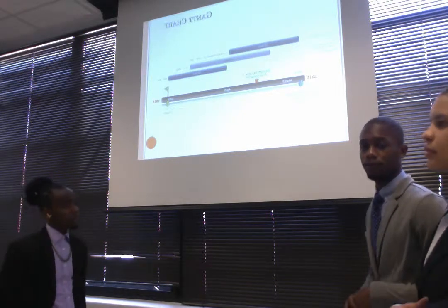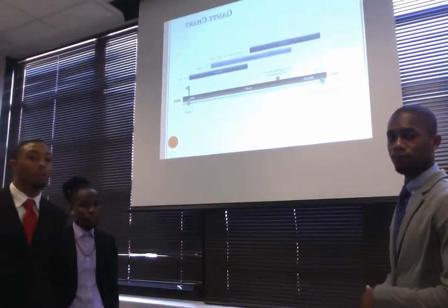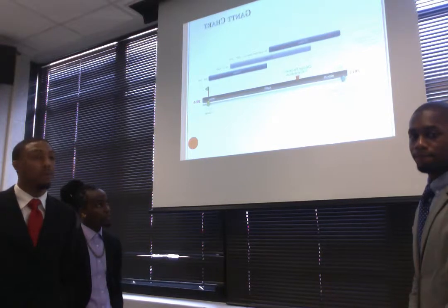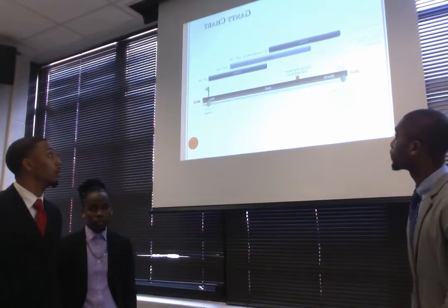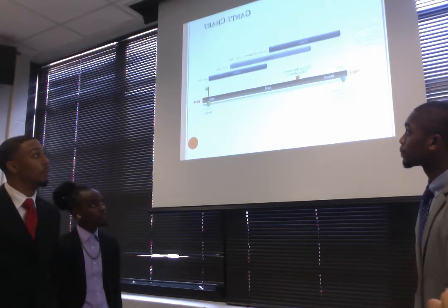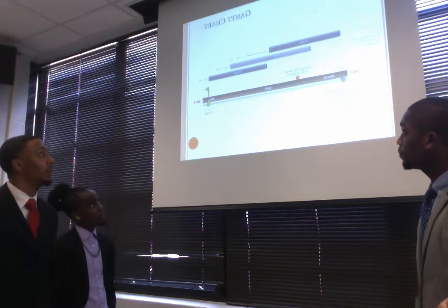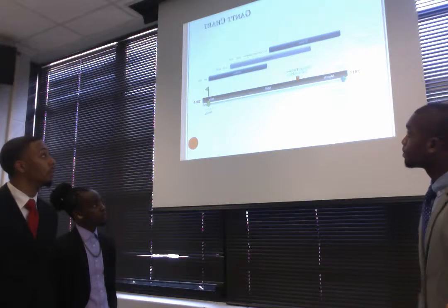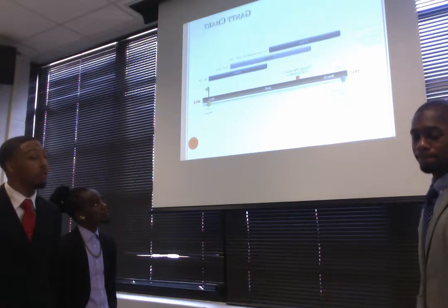So the Gantt chart is basically followed off of the work breakdown structure, detailing the flow of events from today, February 27th, all the way up till May 4th, which we declared will be our desired finish date. Here you have the first detailed design. We said it took about a month. It lasted 32 days. The actual start time of this was 1st of February, but for our Gantt chart, we have it starting on today and ending the 1st of March.